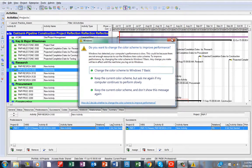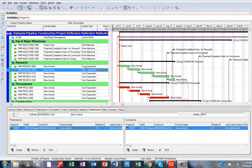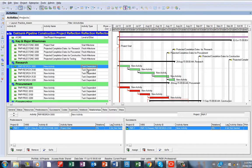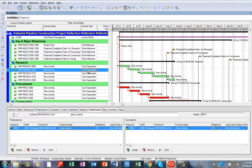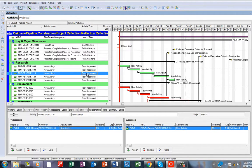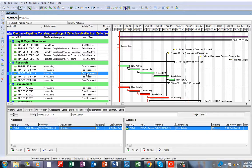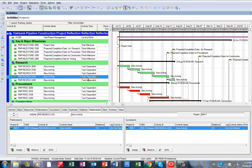The major drawback of the looping is that it creates a continuous loop, and the project goes on and on and on without a finishing end.